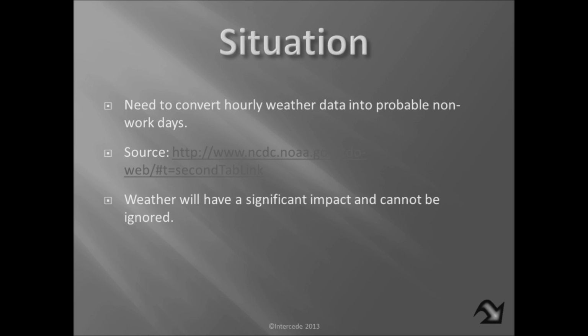Now, what we did in rain delay before was take the average data for, and we used the weather base for that, for rainfall in excess of 0.20 of an inch, or 0.2 inches. And we're going to use that same metric, though I'm beginning to believe that we could reduce that to 0.1 inches to determine a rain day, though that is still indeterminate.